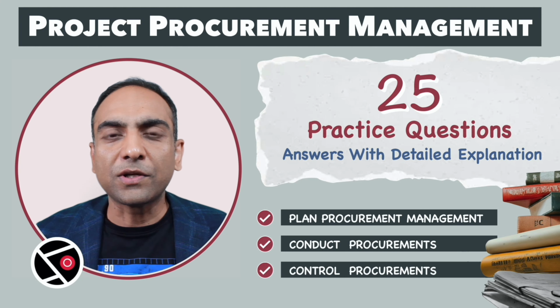D. Bidders Conference. Yes, this has to be the correct choice. All the vendors join the bidder conference to clarify their doubts on the bid documents, SOW, RFP, and other documents. The objective of this conference is to be impartial and ensure that all the vendors have access to the same information. As the QA, questions and answers happen with all the vendors present, they all get to know the same details. Definitely a fair approach. We can drop A. D is our choice.